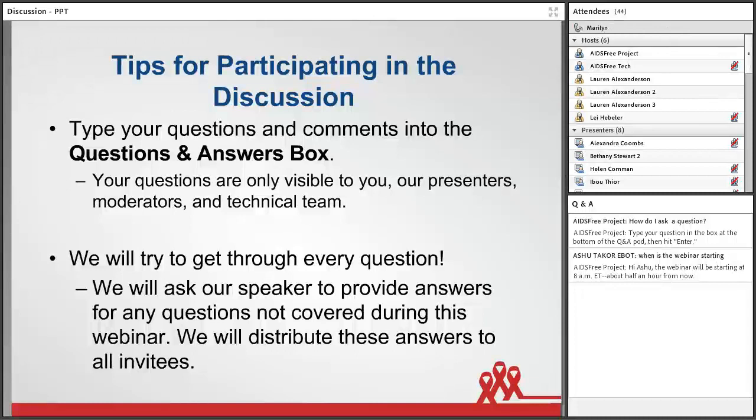Thank you. Yeah, I just wanted to add that at the country level, as this gets rolled out, it's really crucial that the steering committee look on a monthly basis at monitoring the supply pipeline. So what is really happening with uptake and what is really happening with incoming supplies of the product into the country, because there might be a need to actually slow down rollout if the supply environment is uncertain.